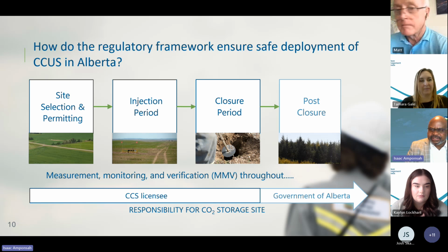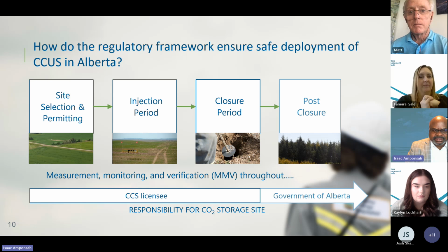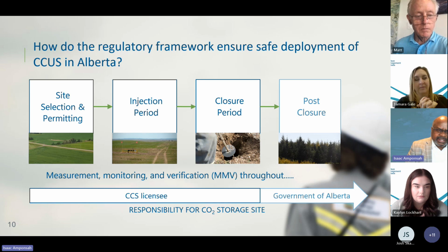And then during the injection phase, we have other directives, and the onus is on the company as well to make sure that they are monitoring their operations. So when it comes to the MMV, that's where that comes in. It's central to everything. They have to install their monitoring devices to ensure that they have their eye on their operations to demonstrate that the CO2 is behaving the way they have predicted it. And then we have the closure phase where they have to demonstrate, by showing the regulator and the public, that over the years of the operation, the MMV, the annual report is demonstrating that the CO2 is contained.